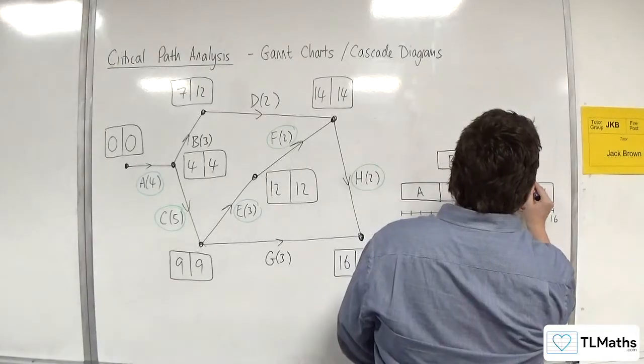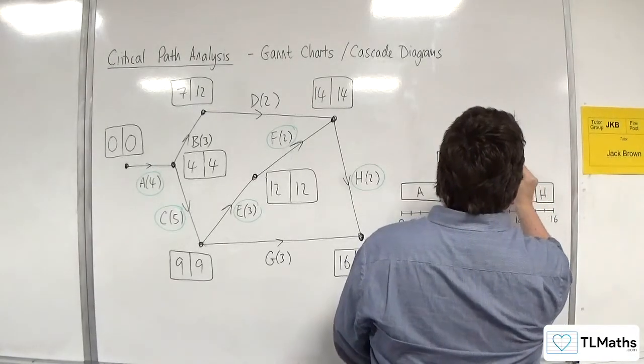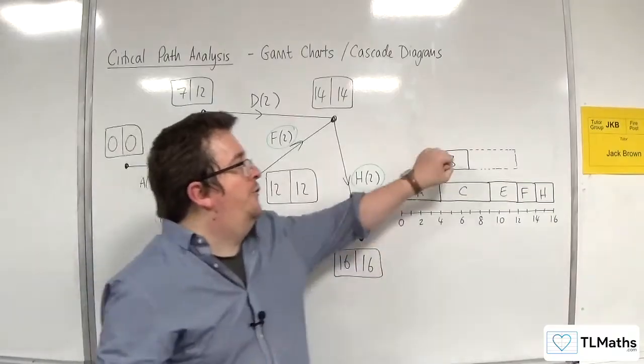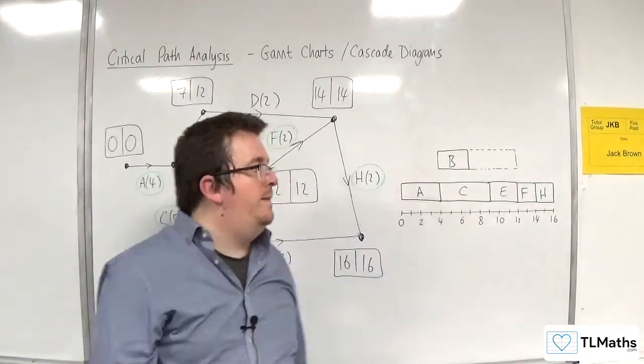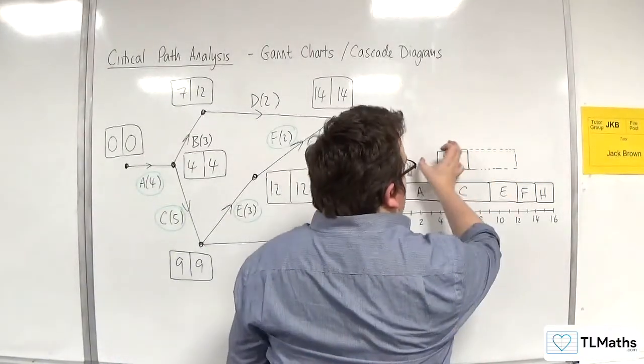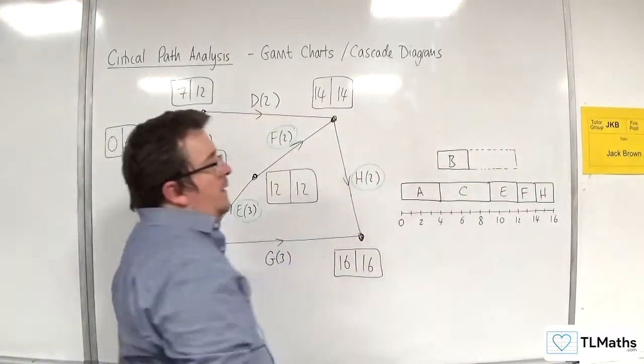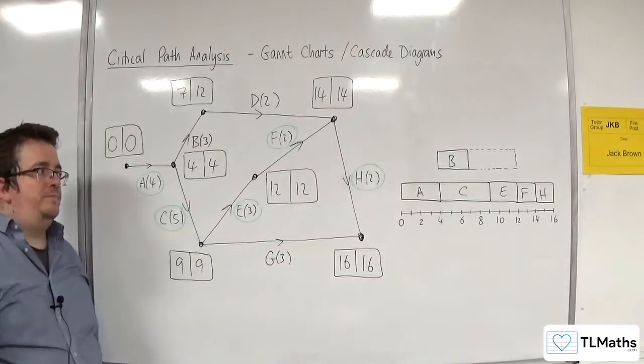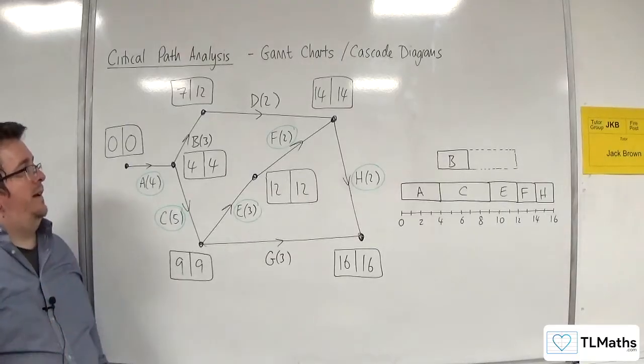So how do we represent that on this? What we do is draw a dashed box that essentially B can float within. So you can kind of move B right and left inside that box. So that's B done.